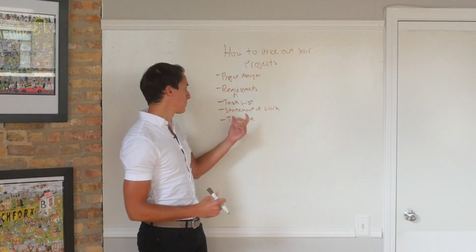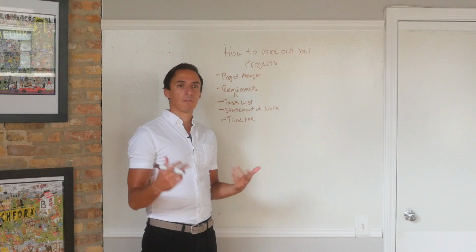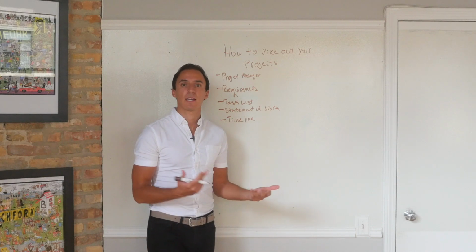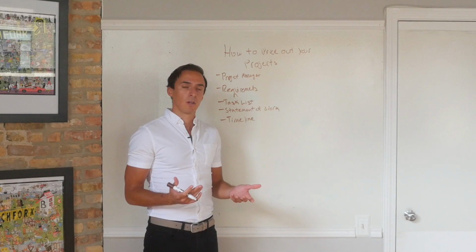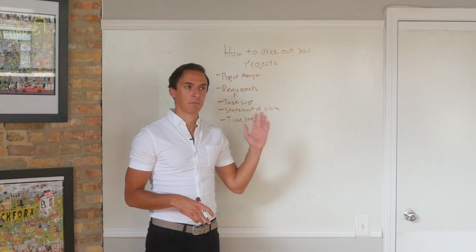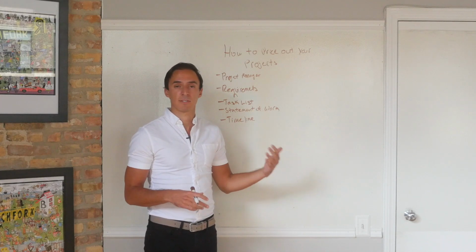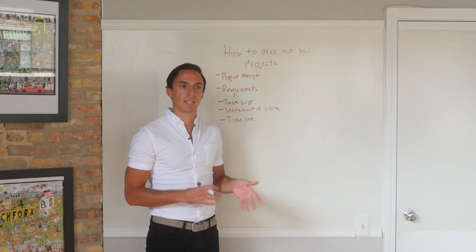And it's really important when you're putting together this task list to think about all the small things that go in a project. Again, I'm just going to use an example of if a client asks you to design a new web page for them. Well, it's not just about, okay, the designer's going to design it, it's going to take them X amount of hours, 5 or 10 hours to design it. Developer just needs to develop it, and they need another 10, 15 hours,